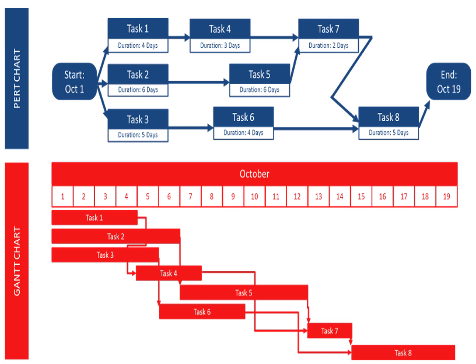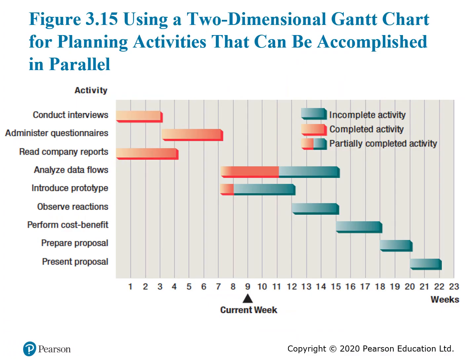For example, task four runs from approximately October 5th to October 7th — a duration of three days — and it also shows the responsibility. When you have parallel tasks it is better to use the PERT chart. Figure 3.15 illustrates using a two-dimensional Gantt chart for activities that can be accomplished in parallel, using different colors to differentiate them.